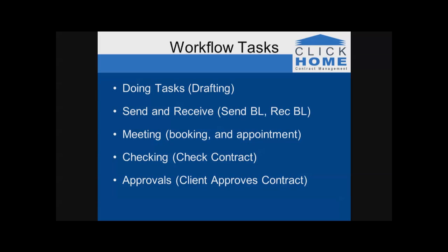So although it is a complex workflow engine and you can put complex relationships in it, the more complex you make it, the harder it is to understand by your staff, and the harder it is to understand, the harder it is for them to use it. So please be aware that you put those tasks in that you want to track that are done, and those that are critical to getting on site, and those are the key things.